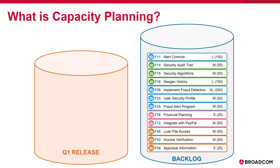However, if you're working with established teams that have been tracking their work in Rally for at least a little while, Rally — and specifically the Rally Capacity Planning page — is going to be your friend. It's going to take a lot of the guesswork out of how much work these teams can complete in the time boundaries of your release. The first thing you're going to do in a capacity plan is add all of the projects or teams that are going to be doing the work — that might be one team or a team of teams. Rally has a variety of tools that help you understand team capacity by looking at historical velocity based on story points and historical throughput based on story count for a similar time period — in other words, how many points or stories did these teams actually complete last quarter, the quarter before that, or the quarter before that.